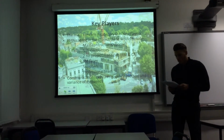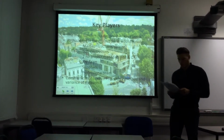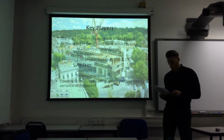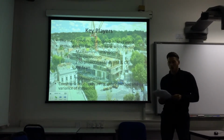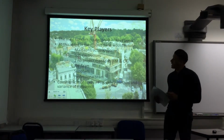Using an effective communication strategy, as these key players are of such great importance to the project. As practical completion nears, communication between certain parties vastly increases in order to ensure any last issues or problems can be resolved so as not to delay handover. As you can see here, at this stage,